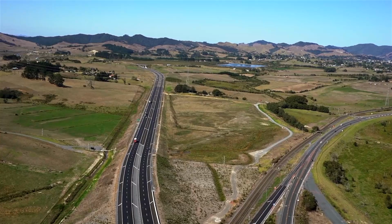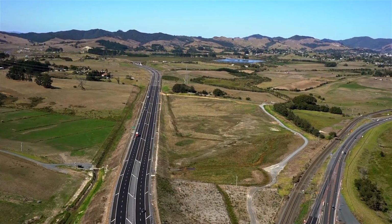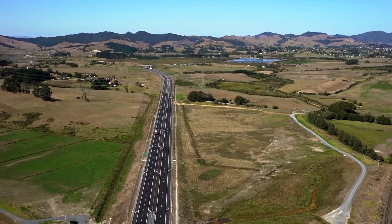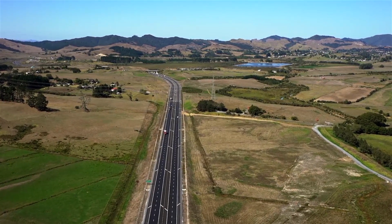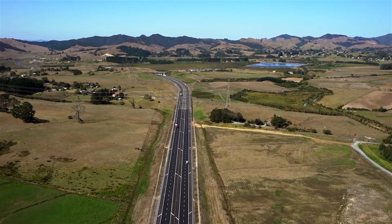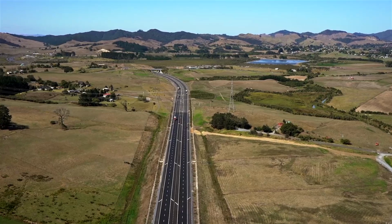Crossing over the Nympta Bridge, we go into Fisher Flats. This area was called Area A. The job was split into 4 areas, A, B, C and D. Fisher Flats was approximately a 500,000 cubic metre fill. The material type was puketoko, which was quite moisture sensitive and challenging to lay. But over a period of 3 seasons, that 500,000 cubic metres was carted into there.